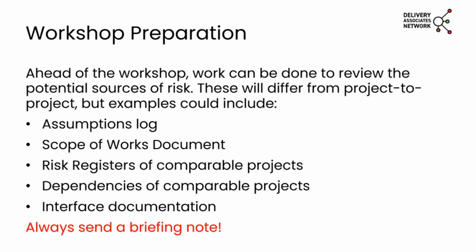Sometimes you can come up with something called a risk breakdown structure, which essentially identifies potential sources of risk in similar projects, so it can get us to think about what risks may emerge in this project. It's super important to always send a briefing note so we set expectations and everyone at least attempts to come prepared.